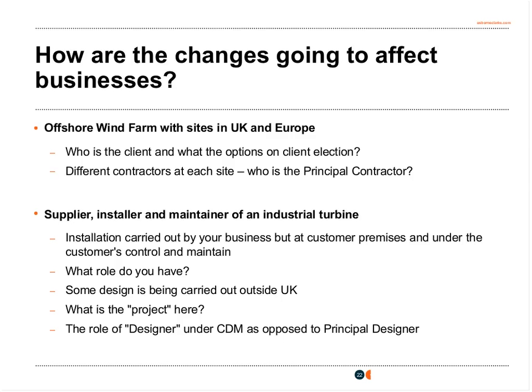So the test, as you're by now well familiar with, is whether there is more than one contractor. Here, is your business the only contractor involved? And are all the people working for you directly employed? If so, it may be that your business is simply going to have to pick up a contractor role, because that is the case. There's going to be no need for appointments. And of course, if that is the case, then you are still going to have to prepare your construction phase plan, because as Alex had indicated, that's now required on all projects.